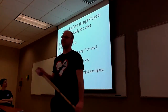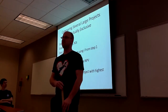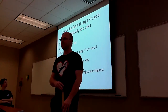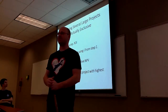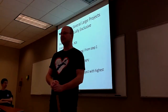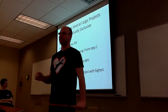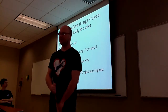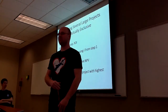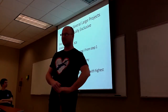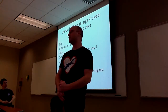When you're comparing several large mutually exclusive projects, here is a basic algorithm to find the more attractive project. First, establish your minimum acceptable rate of return. In step two, calculate the net present value for each project using the interest rate from step one. In step three, eliminate any projects with a negative net present value — those are not the most attractive. In step four, from the remaining projects, select the project with the highest net present value.